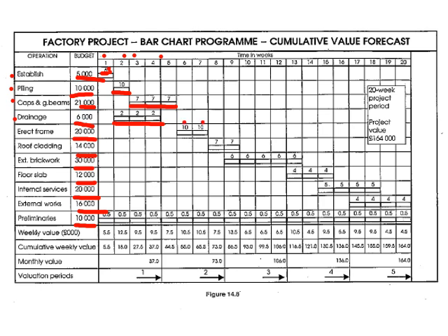You can actually go into more detail and divide it more evenly. If you're using a program like CCS or Microsoft Project, you can actually do it very accurately, where in the first week you will have more expenditure than say in the second week. You will have more resources allocated within the first week than in the second week.